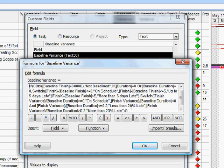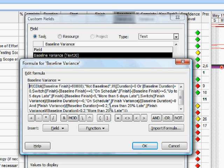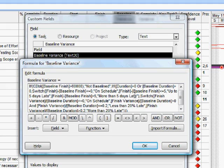Note that what this formula is doing basically is returning values. If a task isn't baselined it's telling me that, it's returning the value not baselined. If it's on schedule again it's returning a text string to that effect. If the task is a task which actually has a duration then it will calculate whether it's less than 20 percent complete late or rather more than 20 percent late. If it's a milestone task, in other words one with zero duration, then we can't really do a percentage so it returns strings such as more than five days late.